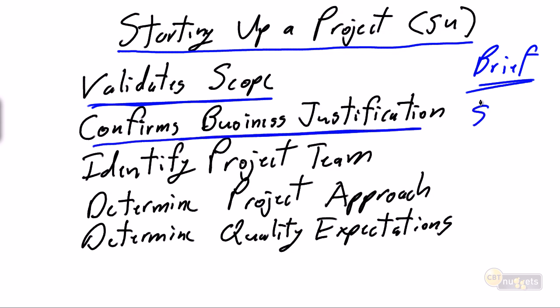Does it make financial sense? The cost for the project is going to be $50,000 and the annual payback for the project is going to be, let's make it simple, $10,000, no interest, no cost of money, a 5-year payback. Is that an acceptable return for the organization? Now, I know cost benefit analysis is much more complex than that.